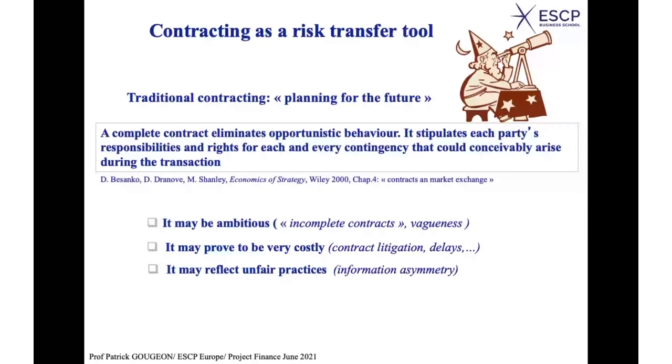He will make money by coming to you later. Okay, we signed this contract. You asked me to do this and this and this, but look at this. It's very dangerous. If you don't do it, you have a safety issue there. And then he will say, okay, I can do the job. Then he will charge extra. And he will charge so many extras like this. That is his main source of profit.